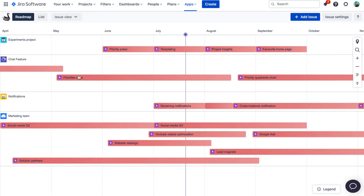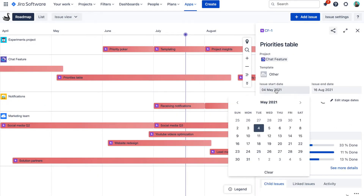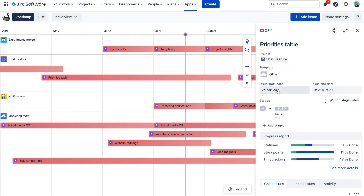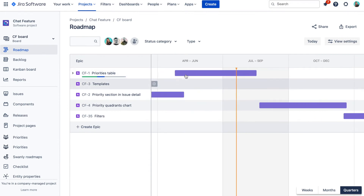If I update the start or end date of an epic or any issue in Swanly, it will also be updated in the Jira ticket itself and on the Jira project roadmap. And of course it does work the other way around as well.